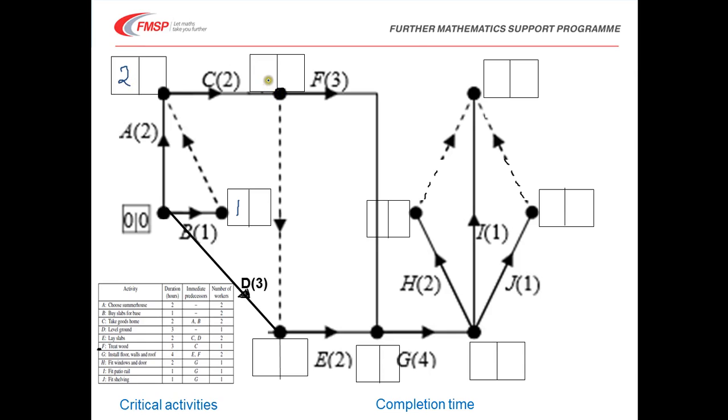You've got 1 coming in here into this box, so that's 2 plus 2, which is 4. You've got 2 arcs coming in to this box, so we've got a 4 plus 0, which is a 4, and a 3, and you take the larger of those, so that is a 4, and then you should be able to just work through the rest.